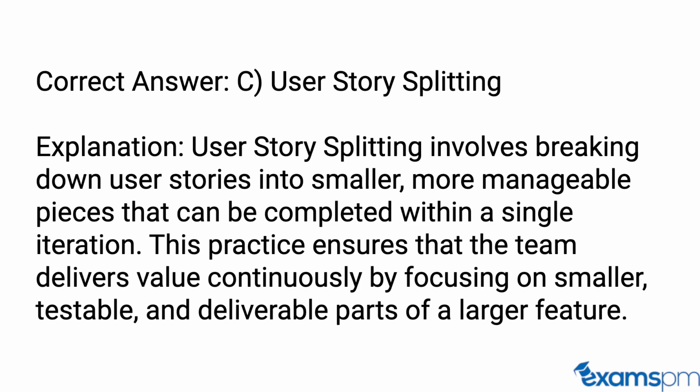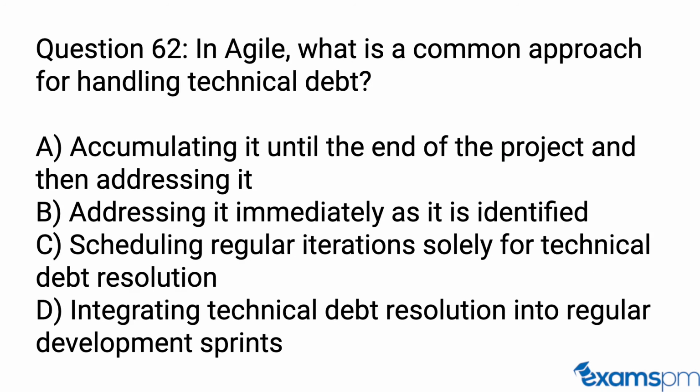Correct answer: C. User story splitting. Explanation: User story splitting involves breaking down user stories into smaller, more manageable pieces that can be completed within a single iteration. This practice ensures that the team delivers value continuously by focusing on smaller, testable, and deliverable parts of a larger feature.